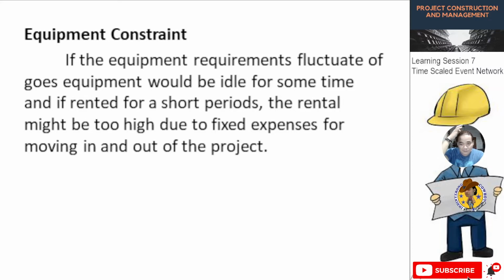Okay, so if the equipment requirements fluctuate, of course equipment will be idle for some time, and if rented for a short period, for example if there is a problem with your equipment, the rental might be too high due to fixed expenses for moving in and out of the project. Meaning the mobilization of the equipment. Imagine if you have one equipment that fails, then you have no other choice but to rent. So the rental price is very high. That is why we need to properly utilize and maintain our equipment.